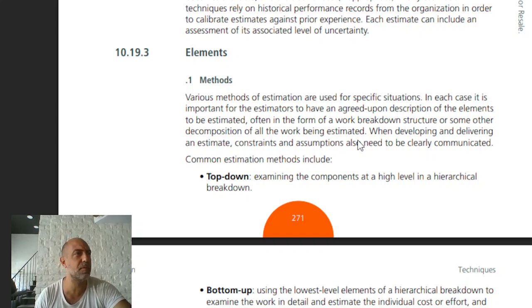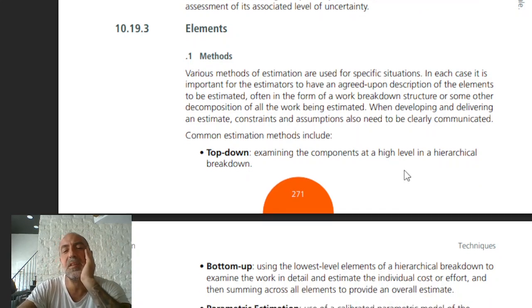That's actually important, I feel, because what we end up doing is looking at how much we estimate this, but that's the percentage of us going off. So if it's $100 at 10%, which means we should expect 110, right? As costs. If it's $100 at 50%, that's like 150. So we work to reduce the 50 and to better anticipate for the future. And I feel that could be a systematic approach to evolving.